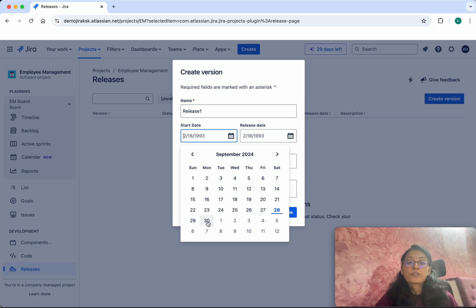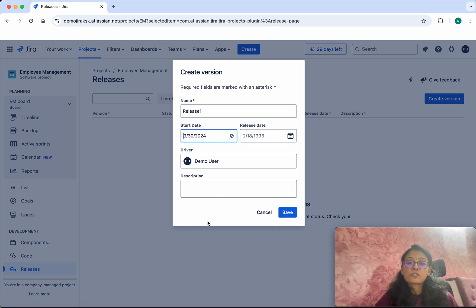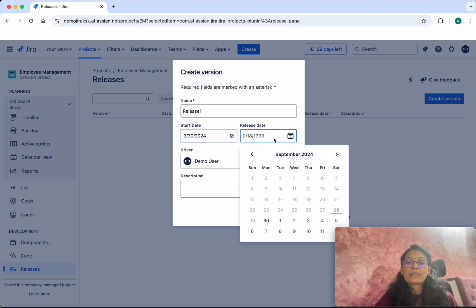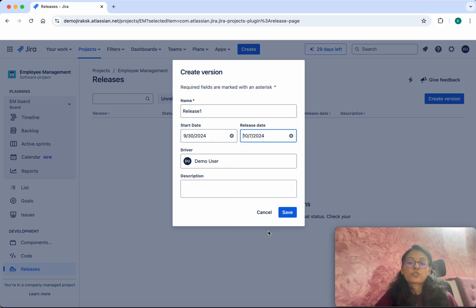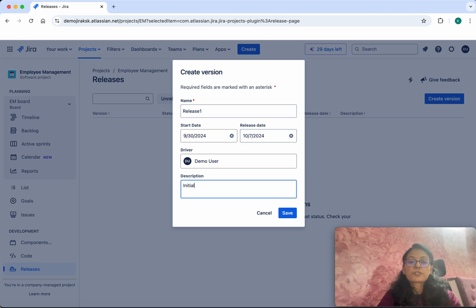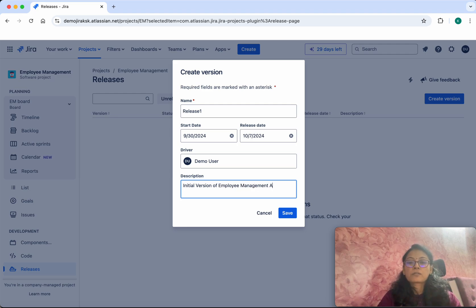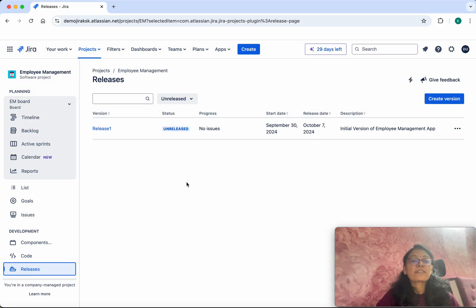For the start date I am going to give 30th September, and the release date I am going to give 7th October — so every week we are going to release. I'll give the description as 'initial version of employee management app', then click Save. The release was created successfully.